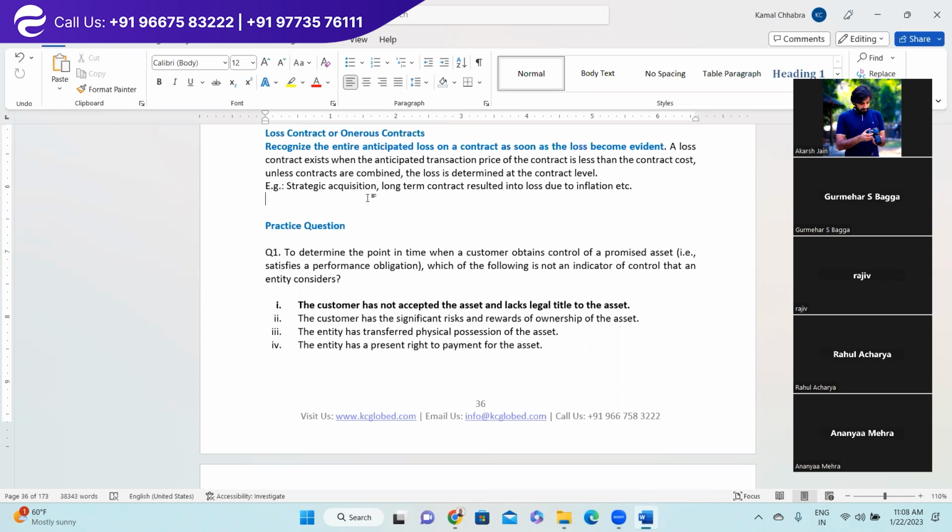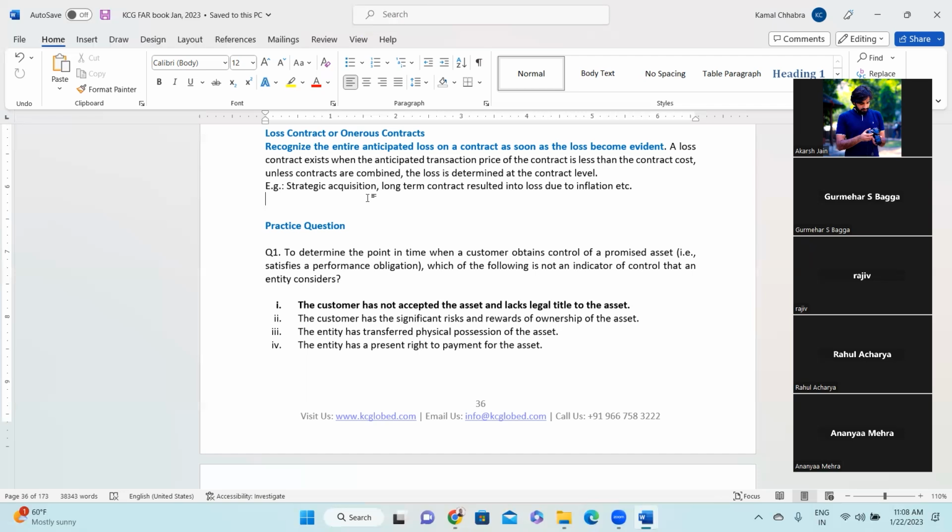Third reason may be, like Kashish said, the contractor bids a lower price even though they know it may not be practically possible, but just to gain the contract they bid for it, right? Later on they start creating problems, and then in the end we need to pay escalation, right? This is what you might have commonly seen. But there is a more important part to it.